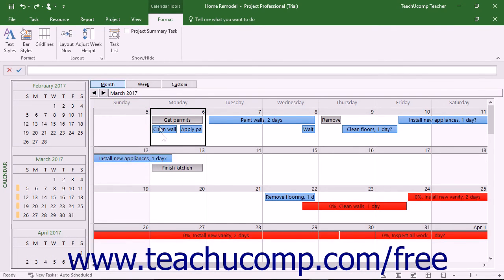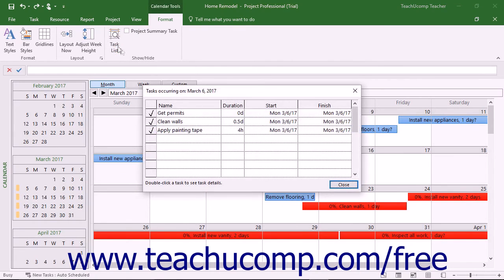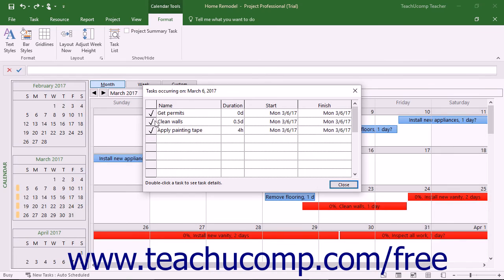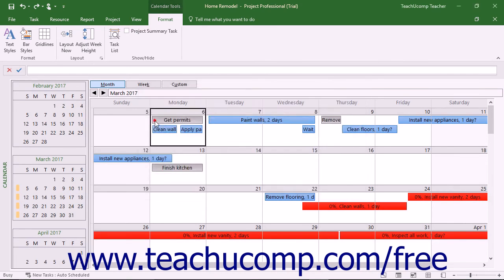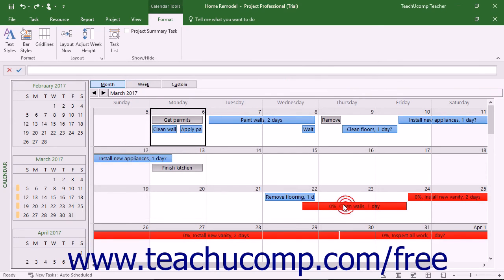You can also click a day shown in the Calendar view and then click the Task List button in the Show Height button group on the Format tab of the Calendar Tools contextual tab within the ribbon to display a Tasks Occurring On dialog box that lists the tasks occurring on that day. You can double-click a task in this dialog box to view its details in the Task Information dialog box, which you can close when you are finished.